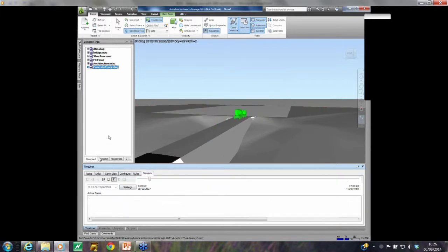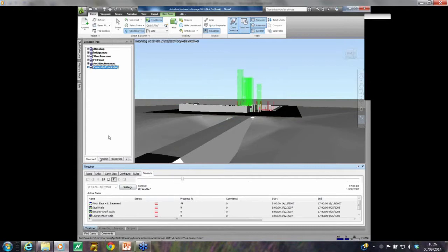And this will be useful later on if we were to try and do some clash detection. Could it be that there's something impeding the progress of the delivery truck based upon our project sequence? It might be easy to miss that if we were just using the project software, but if we can link it to elements within our BIM model, we get a real-time preview.